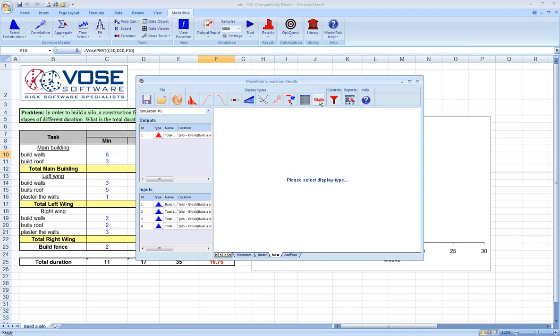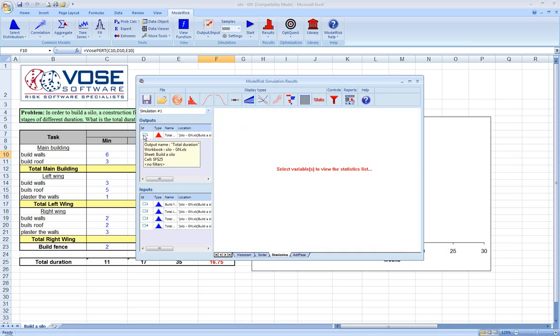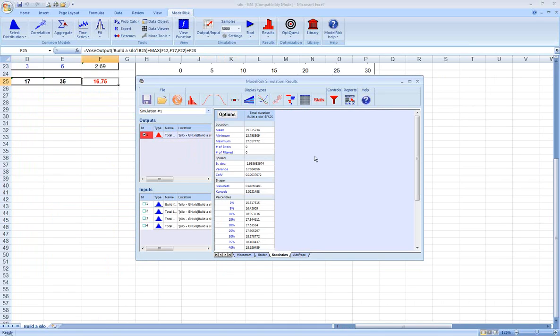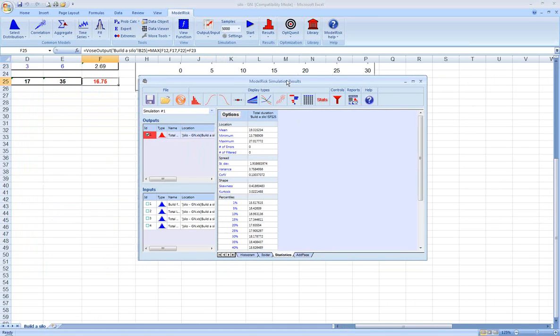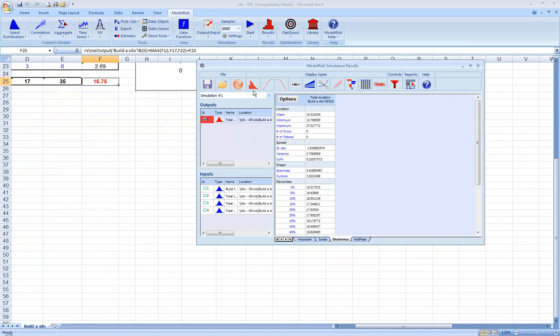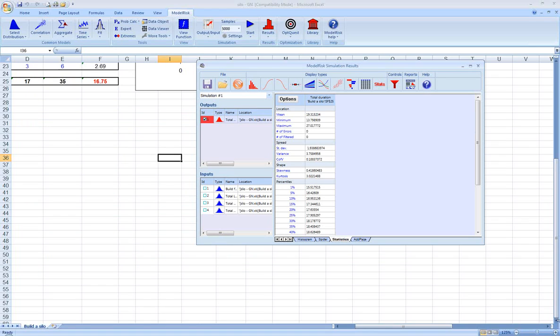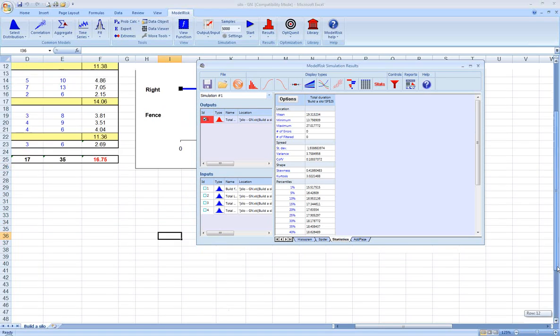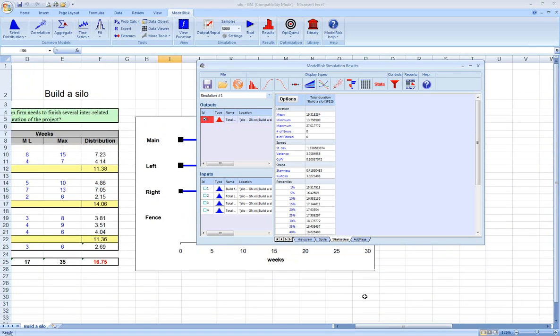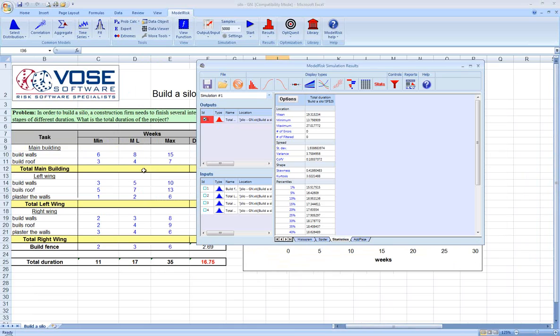Another interesting piece of information when doing project risk analysis are the statistics. I'll just point out a couple of things here. Within this model, if you add up all of the most likely values for all the different pieces of the project, you get about 17 weeks.